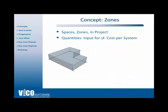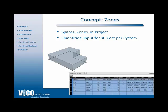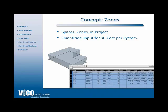The first step is to use zones, as explained earlier. These zones represent spaces that you can then assign to line items inside VICO Cost Planner, assign a unit cost, roll up that unit cost, and define a price for the project. These unit costs are typically dollar-per-square-foot costs that you apply based on the type of building and the use case of the area — whether it's retail, office, or parking. In medical buildings, you can break it down further and include cost for an OR, a nurse's station, and circulation.